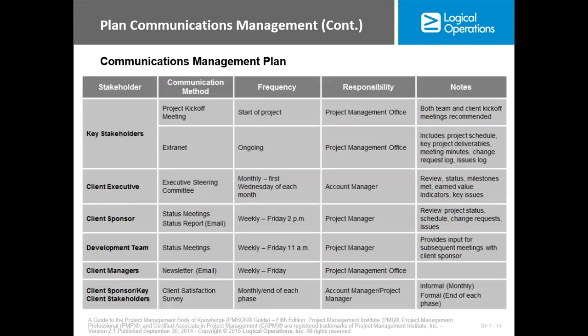Now, this is a communication management plan. We have key stakeholders. What information are you giving to them? Communication methods: we have project kickoff meetings, extranets. Then we have frequency: start of the project, and the extranet ongoing. Then responsibility: the project management office. Then we have notes: team and kickoff meetings recommended.